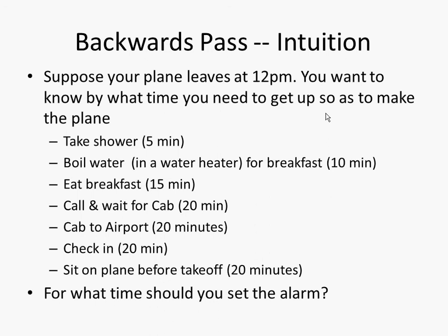So you have to get up no later than, I think, 10:15, because you've got to get the water boiling before eating breakfast to avoid delaying the plane. In other words, you've got to get up according to the minimum of these two, when you have to start taking the shower or boiling the water. Whichever one is the key constraint to let you finish on time. In this case, it's boiling the water. Okay?